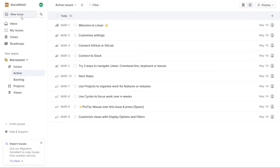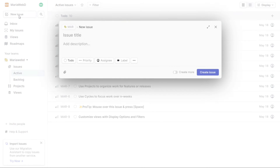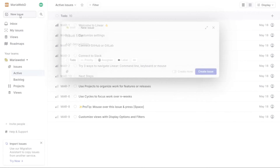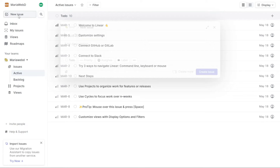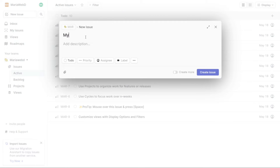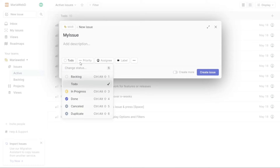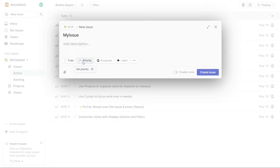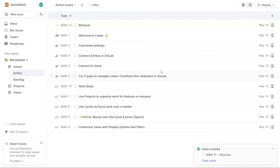The New Issues tab in Linear is a powerful tool that allows you to create a new issue quickly and easily. To create a new issue, simply click on the New Issues tab and a pop-up window will appear. From there you can enter the issue title and description, set the status, priority, and label, and assign it to a specific team member. Once you have entered all the necessary information, click on Create Issue and the issue will be added to your workspace.